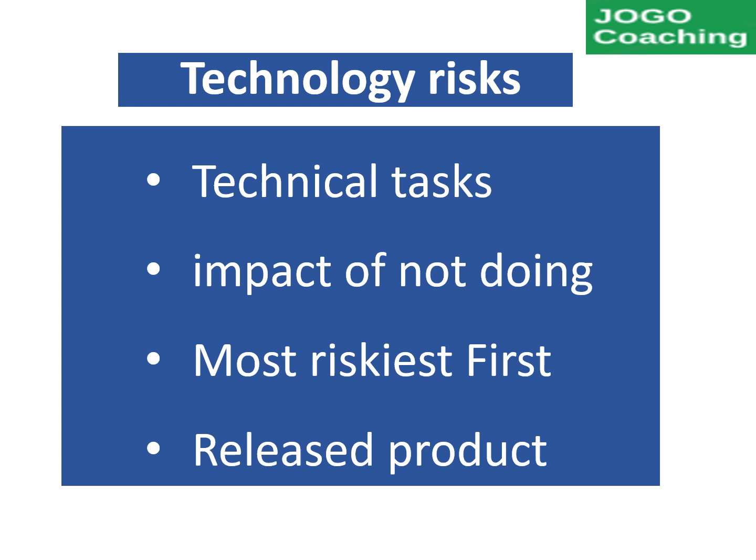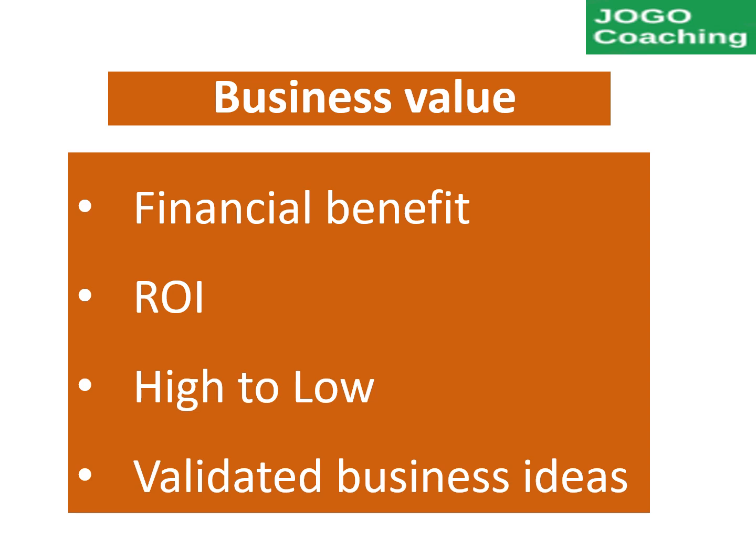This technique is useful if the product is already released to customers and enhancements are planned. Another technique used for user story prioritization is business value. In this technique, financial benefits of delivering the user story will be assigned to each story. The benefits will be based on the return on investment or cost avoidance by implementing the user story. User stories will be ordered from highest value to lowest values. This approach is highly efficient if the team has validated business ideas.